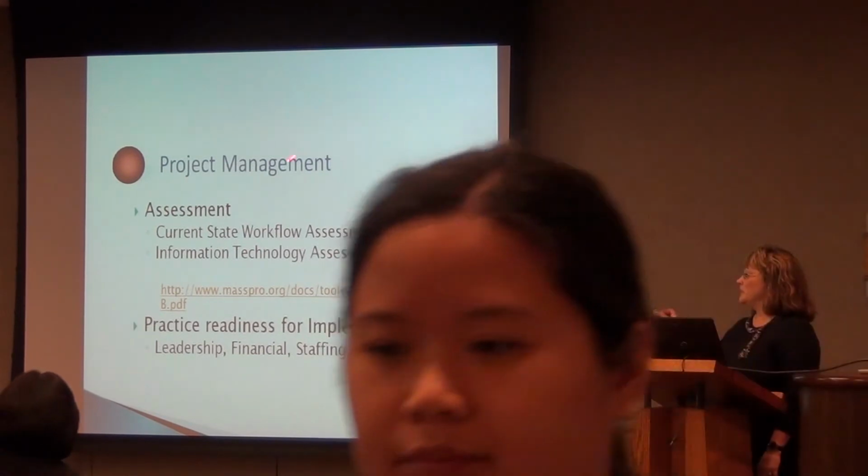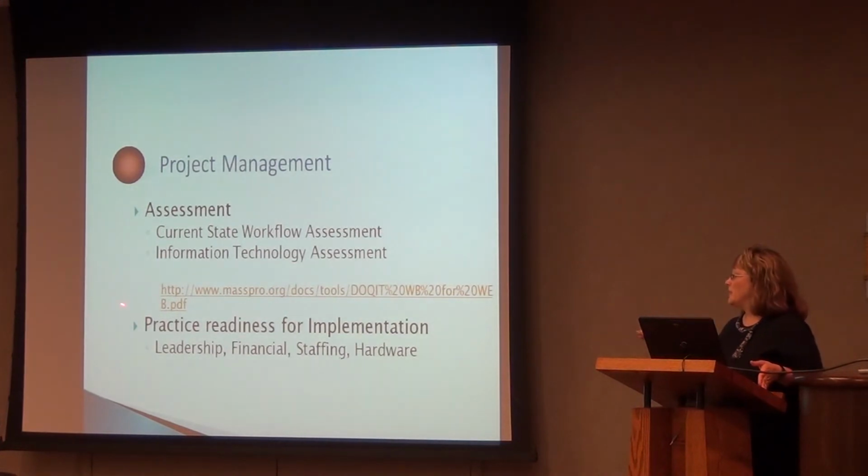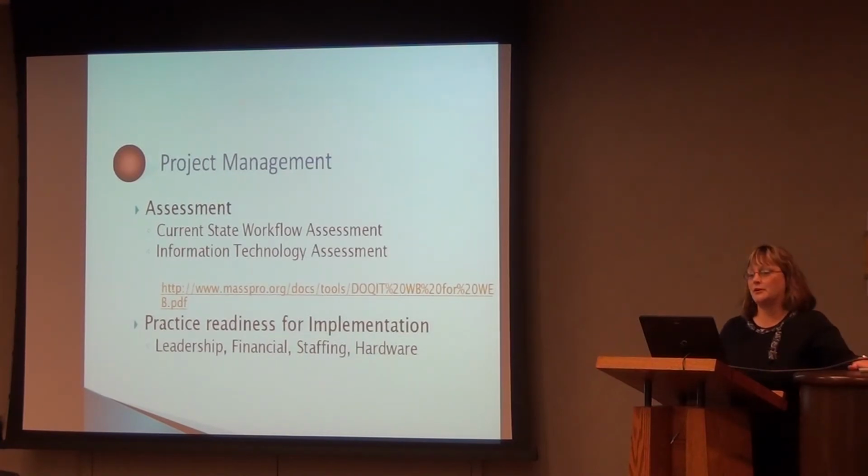So for project management, you want to assess your current state workload. How are you doing things now? MassPro put out a great guide that you can use to assess your practice and think about how you're going to do that in the future. Also included is an information technology assessment. When you put computers into a practice, you want to pay attention to where you're placing them. If your nurses work one-on-one with your physicians and they do the initial intake in the exam room, it doesn't do any good to put a desktop in the hallway for the nurse. That's not where they're collecting their information. So you need to understand where that workflow is occurring so you can appropriately place the equipment.